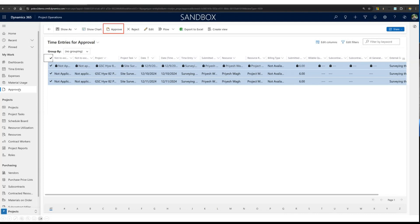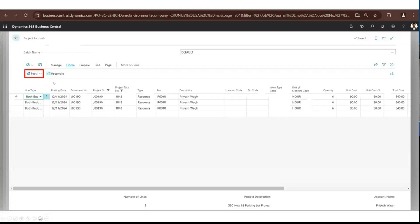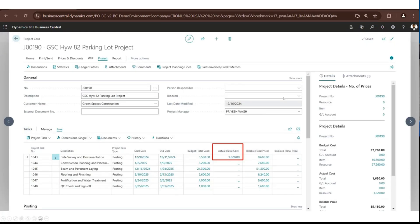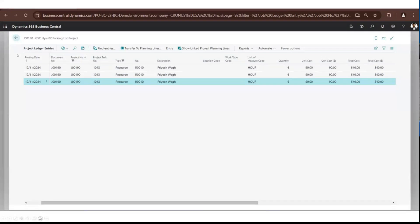In Project Operations, when you approve project approval records — time entries and expense entries — they create actual records. Our integration takes the approved time entries over to Business Central under project journals. The number of hours, unit cost, and sales price are all synced over. You can then see actual costs rolling up in Business Central, and the posted time entries appear under project ledger entries.